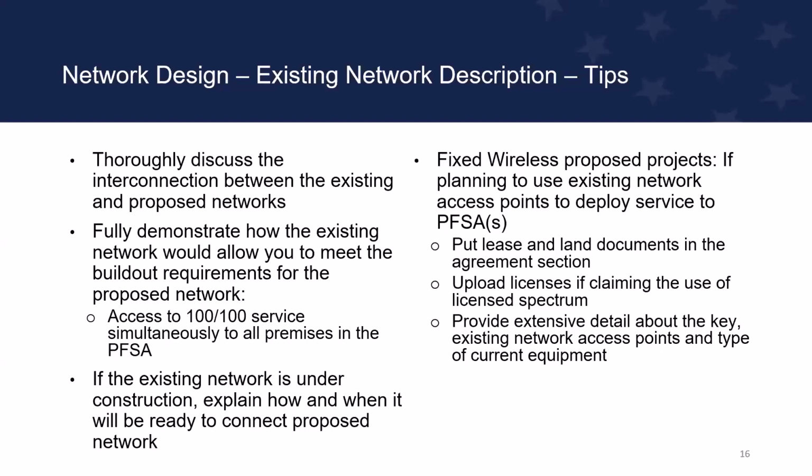And a big key is the existing network under construction, and that comes into play in a couple of different locations. If it's still under construction, tell us when that network is going to be ready to interface. It does us no good for you to provide details on how your proposed network will rely on your existing network if we don't know that it's up and running and in service.